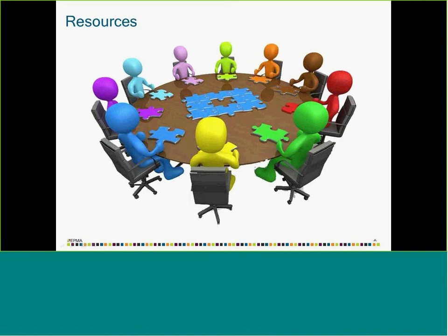Now you can define these resources or the cost of your project in two ways, bottom up or top down. Bottom up basically means that a project manager will go ahead and define your project, assign resources to the tasks, and then publish these projects in your project server.